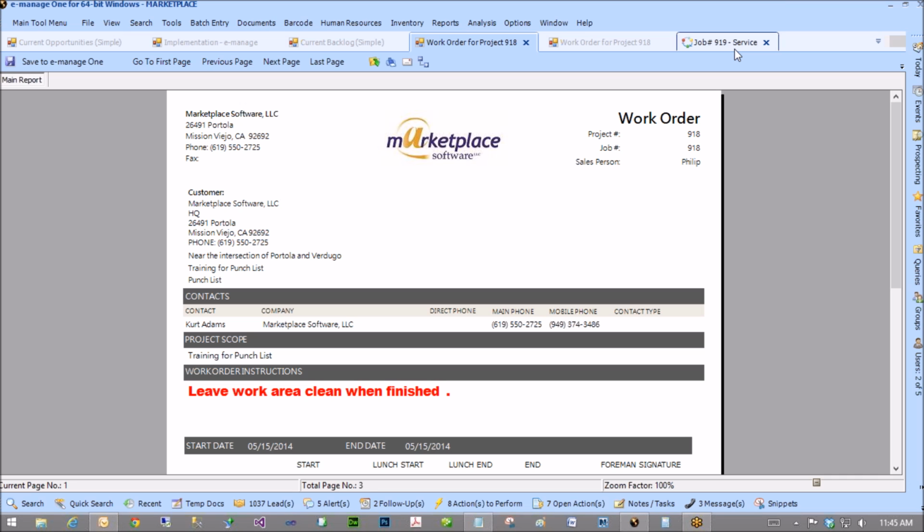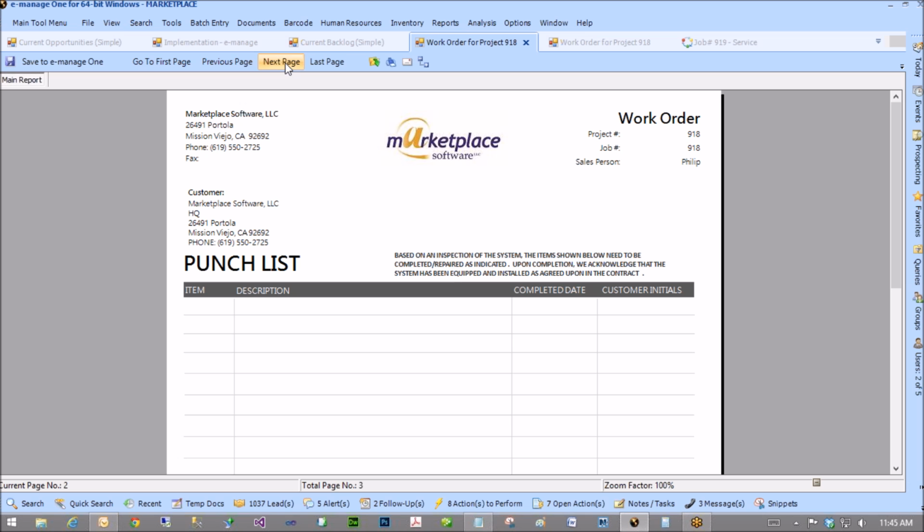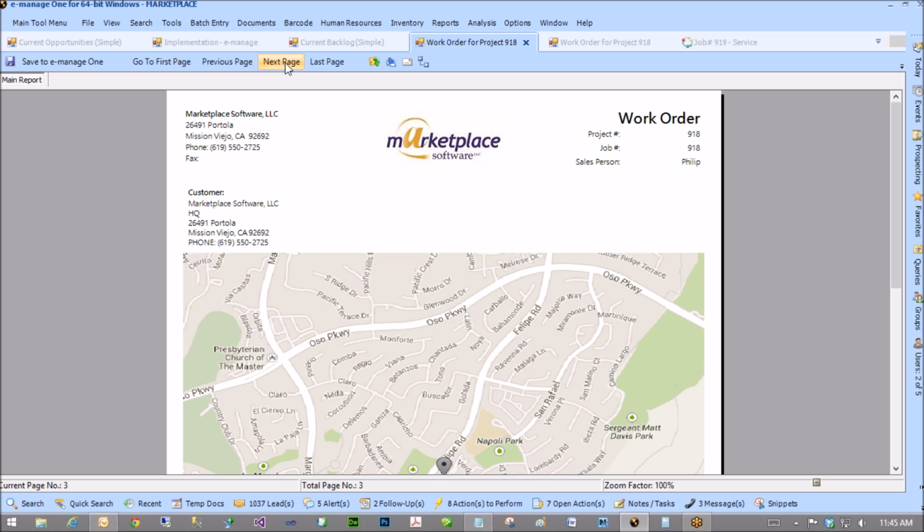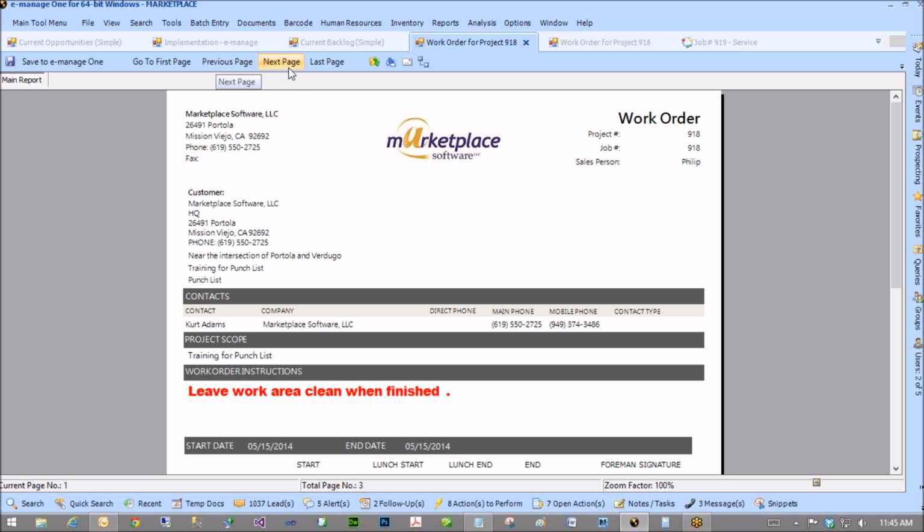Right. And on the same token with that, when you're creating an action item for an order to be placed, so let's say whoever puts in the items into the BOM and the order's ready to be placed, when that action item gets sent that says place this order, it doesn't reference which order they want you to place. So in the notes of that action item, you have to put please place punch list number 1. Or please place punch list number 2.